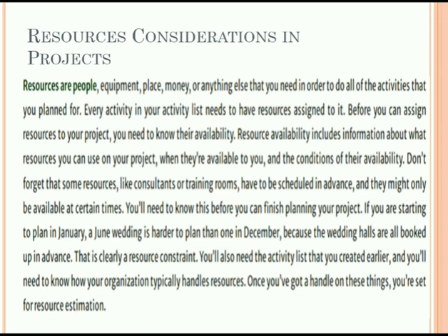Before you assign the resources to the project, you need to know their availability. If I am assigning different resources and they are not available, then there will be a delay in the project completion, which will have a bad effect. That's why, before assigning resources to different tasks or people, you have to first find out all the information needed for the project, and the resources' availability: when they are available to you and the conditions of their availability.